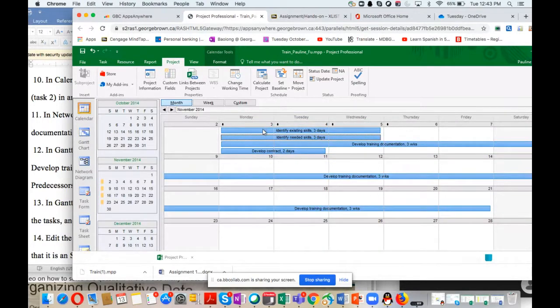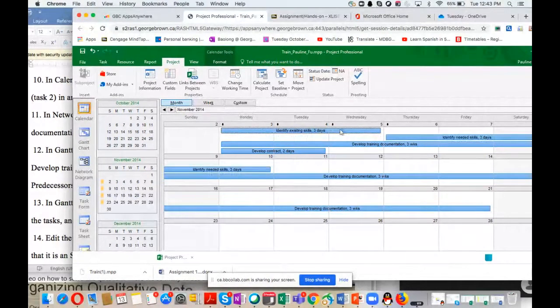So you just click task 1 and drag it into task 2. When you take task 1, you see a little icon that is start to finish link. You click and drag it into task 2. Release your mouse. Now you have FS, finish to start relationship, meaning you finish task 1, then you start task 2. Okay.